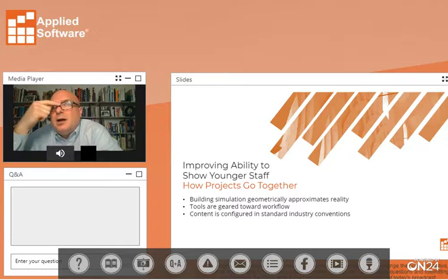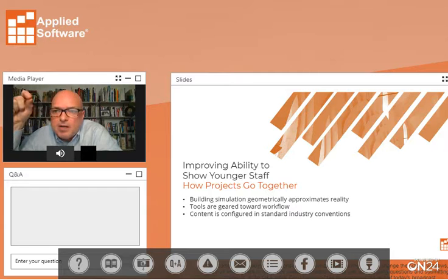And I think to me, it's sometimes we take the easy way out in our process by picking something graphically significant, but not necessarily informationally significant, right? A great example I had with a customer recently is that in their early schematic process, they have a placeholder elevator that they throw in, and it looks great graphically on a really schematic plan, but then the technical architect that's going to be picking it up in late DD and early CDs says, well, this is not accurate because it's not tied to real world sizes. It's something that she's going to have to replace later on.